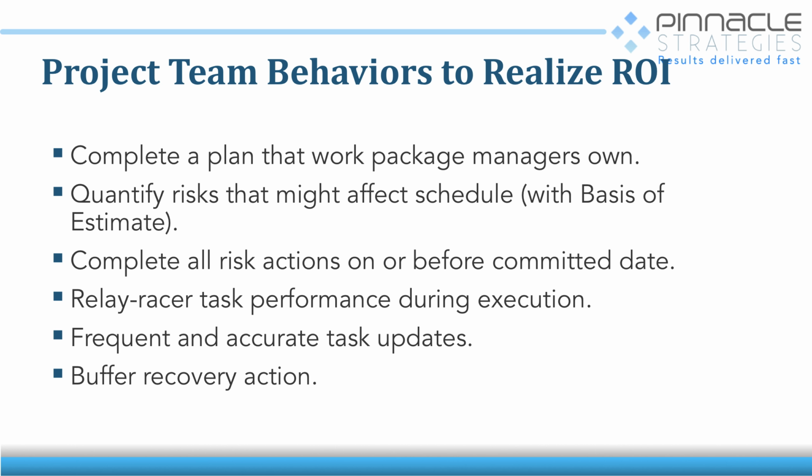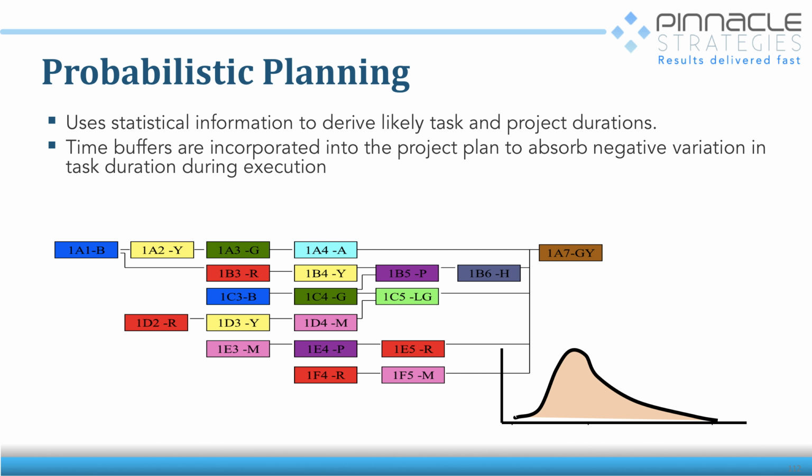Now we're going to take that and we're just going to shift it a little bit, and we're going to start focusing more on changing the activity based on what's stopped and what's critical. We're changing the definition of critical to what tasks, what projects have the highest risk. So we're shifting the emphasis away from dates to risk, which incorporates the date. And so we use the statistical information to derive the task and project durations.